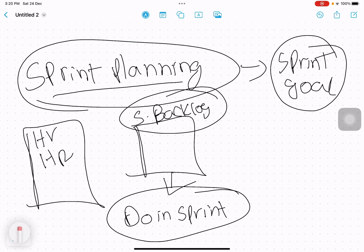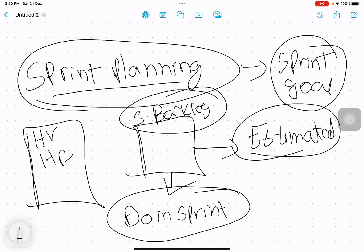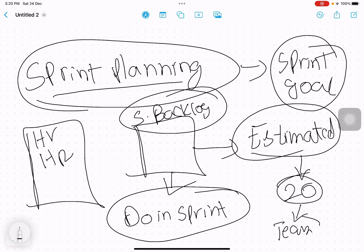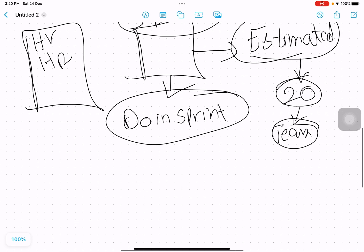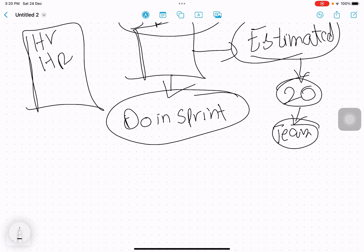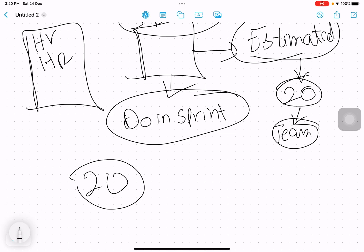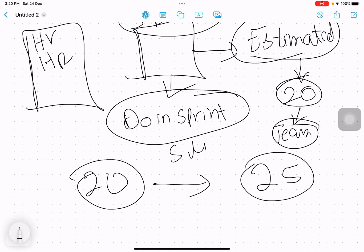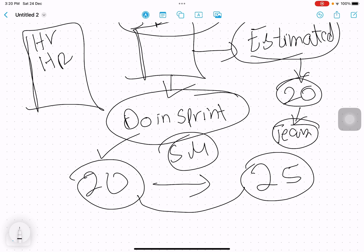An important thing to understand when working with the sprint backlog is estimated velocity. Especially in the first sprint, we estimate how many story points we are going to cover — let's say 20 story points. Since it's the first sprint, this is more of an estimation. The team does this estimation, and there's always negotiation: the team may say 20 story points while the product owner says 25. The scrum master facilitates that negotiation.